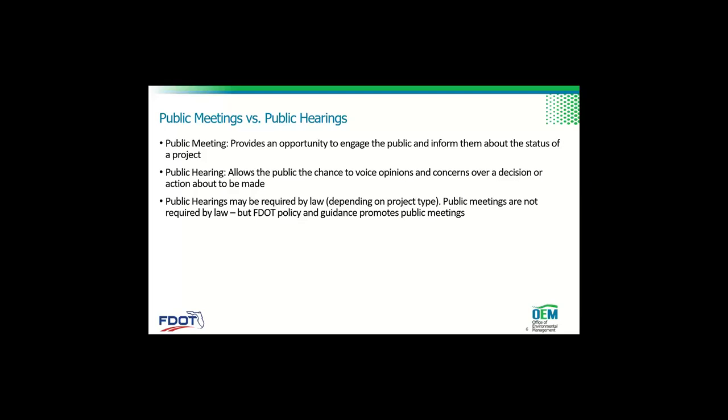Public meetings are informal, and there is a lot of flexibility on how you do them. They're generally used during the project to collect community input, to just let the public know where we're at, what the status of our project is. Hearings are formal and follow very specific requirements and generally are more expensive as well. So public hearings have specific laws that relate to them and how we do our meeting notifications. So you can see why it's important to use the correct terminology between a public meeting and a public hearing.